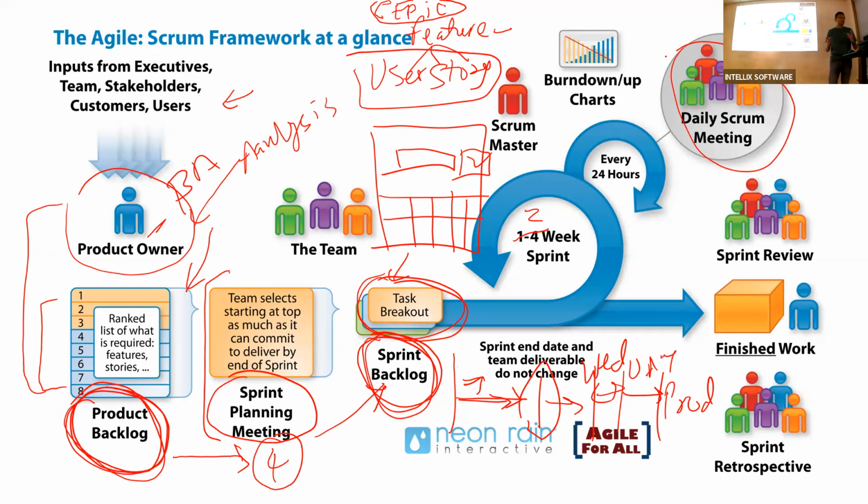But the important thing is the scrum meeting. Typically a scrum meeting is 15 minutes only, not more than that. Report the progress and be done with it. Now, if you still have additional questions, you set up a time with the users and clarify it. But otherwise, 15 minutes is for reporting the progress.